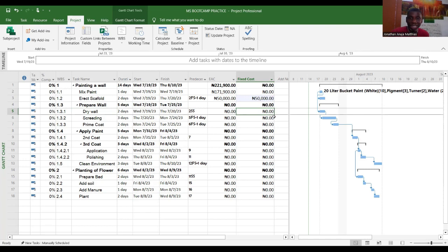In short, the money you have spent, is it lag? I say we should put lag there to dry the wall. I've removed the lag, or I haven't used lag. So do you understand? But this is assuming I am doing the project between December and February. If I'm doing the project in rainy season, I may want to spend a little money to get artificial drying or blowers. Or I apply lag if the client does not care about time. If the client says, I don't have money to give you to use artificial means to dry my wall, then you tell the client, the only thing we'll resort to is to apply lags, so that you have 0 budget for drying of wall.